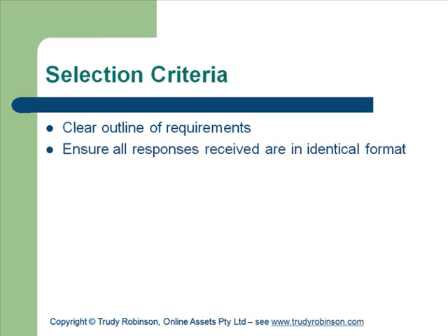Now, one of the most important things to do is ensure that all the responses you get back are in identical format. If you send this out there and you let everyone answer in whatever format they want to, you just can't interpret it, because this one's got it answered here and this one's got it answered there, and you have no tool for evaluation. You have no way of being able to do it. So it's better for you, in the statement of works, to actually put a questionnaire in there and say, give me a rating whether you can do this 1 out of 5, and detail how you would do it.